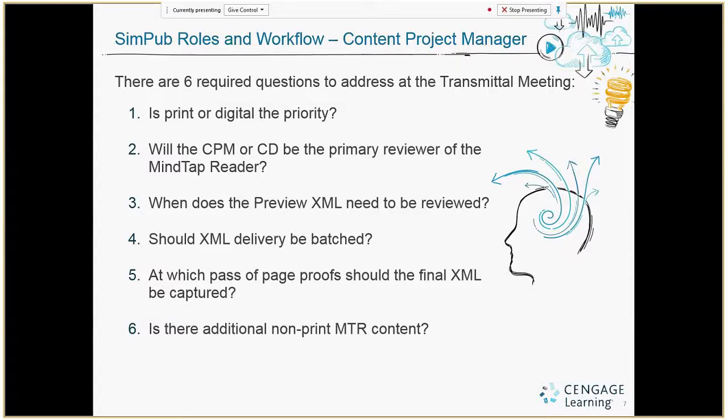For example, if the digital is wrapped up first, that may give our partners in the global product technology team a day, a couple of days, a week even, to make that MindTap reader interactive. That's really critical. If we have an interactive MindTap reader, days can really matter to have a product done and ready in time for our customers. So if it's print that's more important, and getting the files to the printer is critical because we have some commitment, then let's do that first.